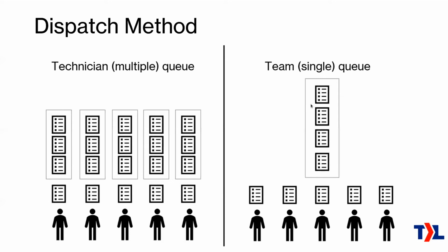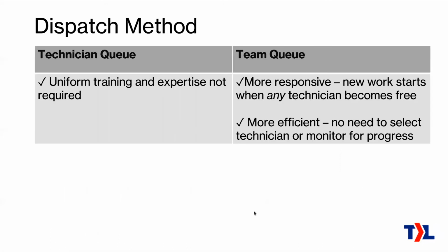The team queue here has a bit of an advantage in that if this ticket goes way over budget, turns out it was challenging, there's still 4 engineers here who are pulling work off the queue. So even if this is a problem ticket, this still keeps flowing pretty well. It is a little bit slower than it otherwise would be, but not in any noticeable way. The queue here keeps moving, even when there's a problem. So it's a lot more flexible in that regard.